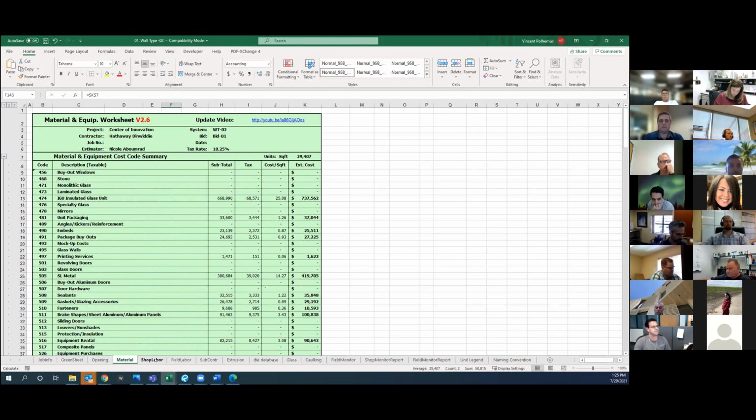So that's the beauty of when we started gathering this data and looking on a daily basis: what did the shop actually make yesterday? What types of units did they make and how many hours were put into making those? Because that now is holistic and captures what's really in there rather than looking at the individual parts and pieces.